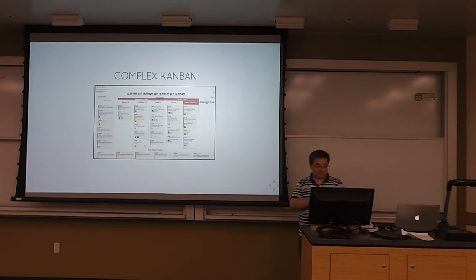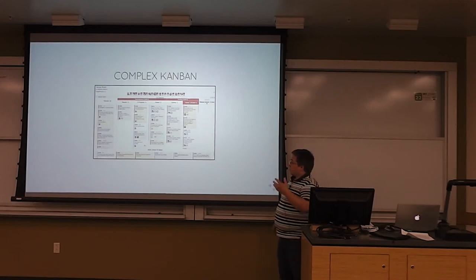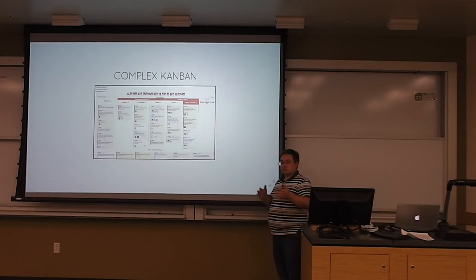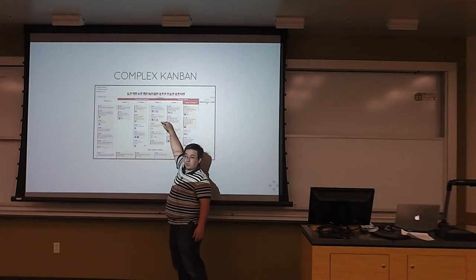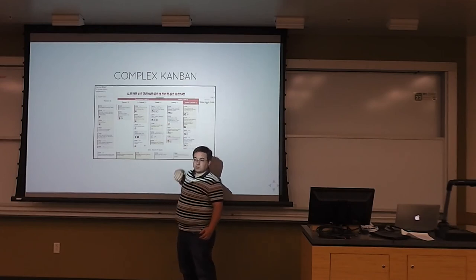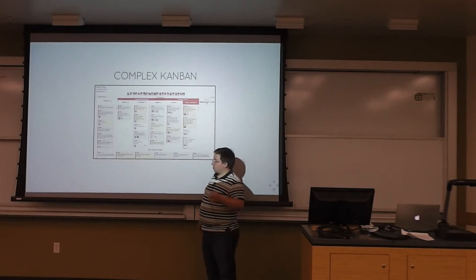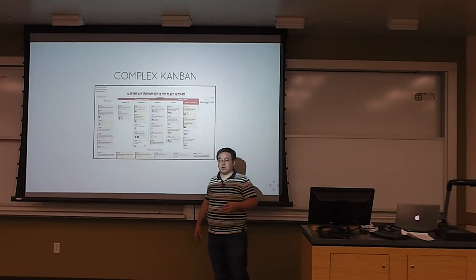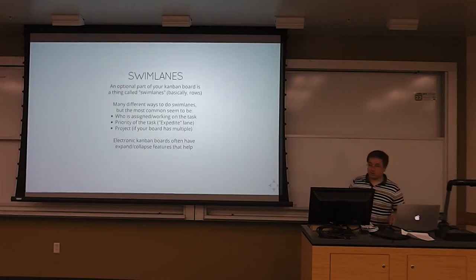On the pull mechanism — the pull happens mostly in the buffer columns between steps. If testers are knocking stuff out quickly, the coded column starts to get very small. The question of UX testers sitting idle while backend testers are busy leads to the concept of swim lanes. Swim lanes are a completely optional feature but most places find them helpful. Basically it's adding rows to your columns where you can divide out different things — an expedite fast lane swim lane, lanes for unassigned work, by who's working on what, by priority, or by project if your board covers multiple projects.